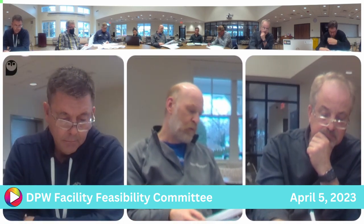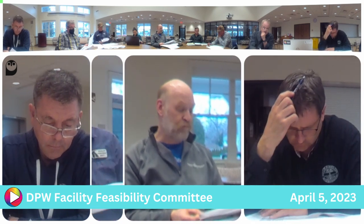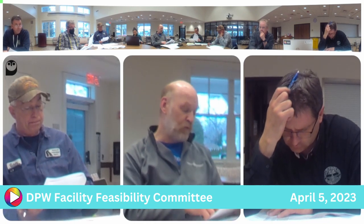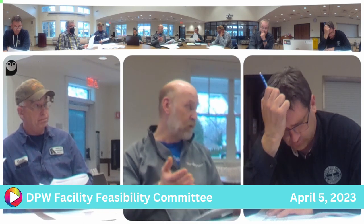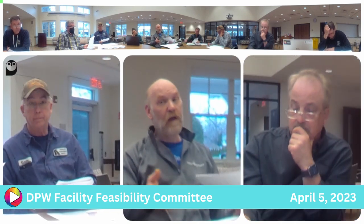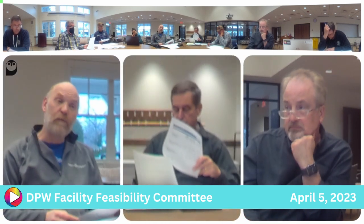And so, there are clever ways you can package this and potentially save a little money. For instance, with something we're doing in Marshfield, all the industrial equipment was basically an alternate in the bid. They chose not to take it, and they're buying it a little bit piecemeal, but they're able to buy it separately from the contract.